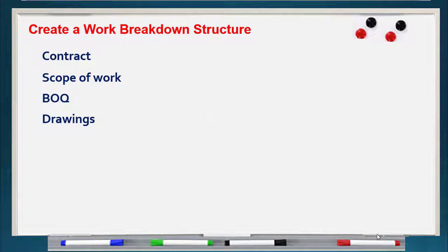Also we need drawings to understand the project. If you want to understand the project, first of all you have to look at some drawings to understand what exactly this project is. So you cannot make a schedule for a project without looking at and studying some drawings. Of course, not all drawings, not all detailed drawings, but some drawings that make you understand the project.